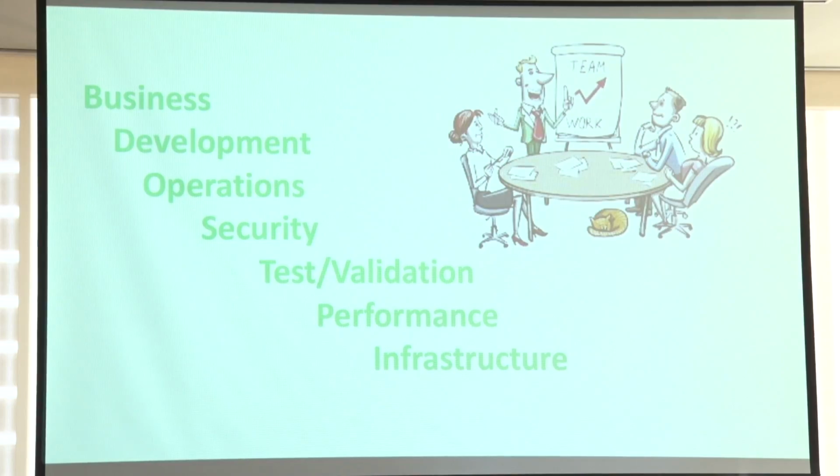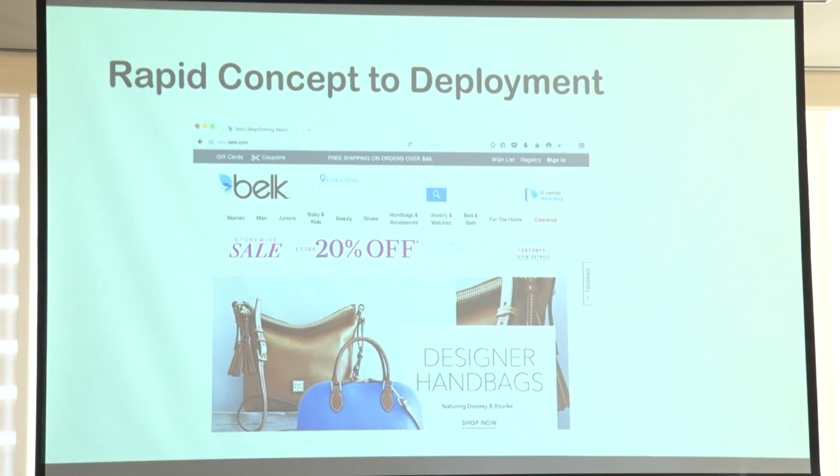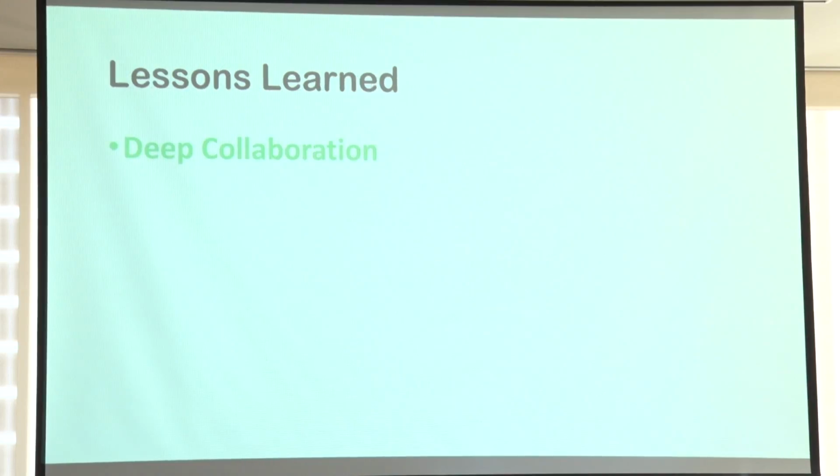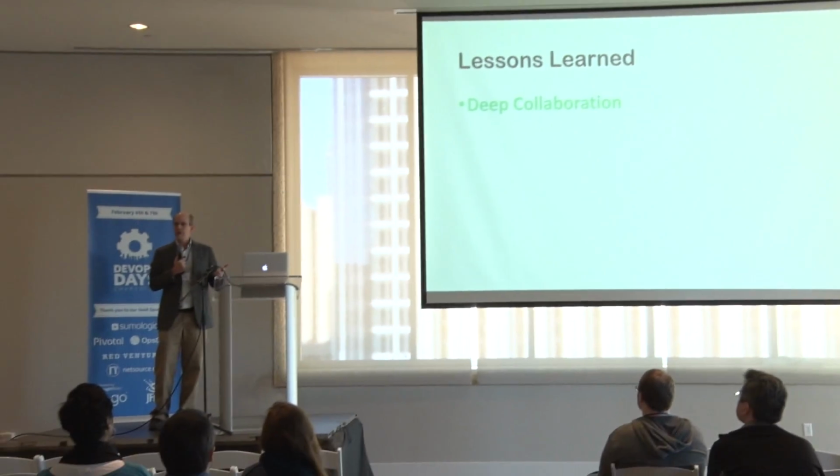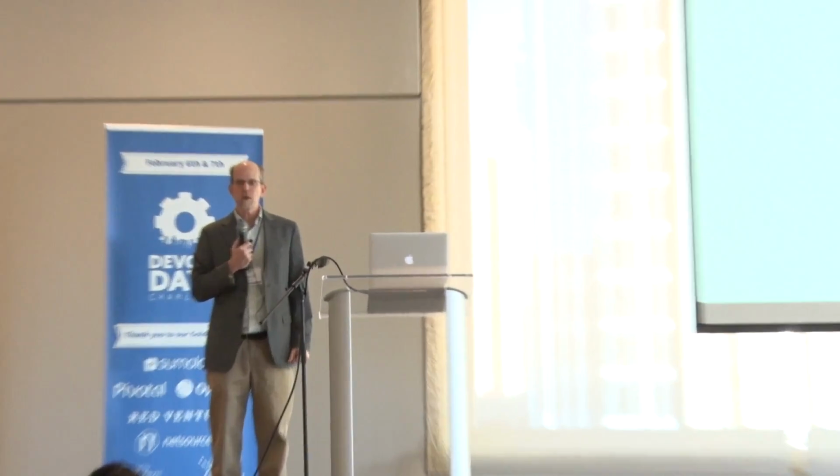In eCom for Belk, what we've done is brought all those teams together, as you can see listed here, on a daily stand-up, meeting together on a regular basis, and we're now able to take a change from concept, putting it to a customer-facing website within just a day or two. All, again, with the same resources, the same amount of effort, but just working together in collaboration, being able to deliver those changes much more quickly, which is amazing comparing that to a user request, which takes 9 days.